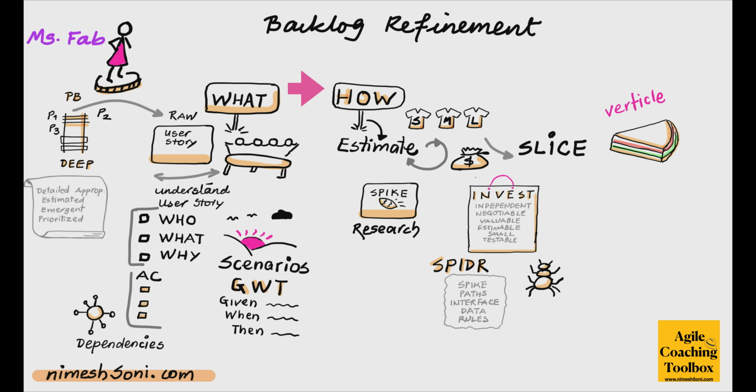And we don't want that because horizontal slices don't deliver any value to our customer. Instead, we want to look at it from the functionality point of view and identify vertical slices, meaning each slice has all these different layers of that cake that we are talking about. But again, focus is not on the technology stack. Focus is on the vertical slice. Focus is on us building a thin slice of that functionality and delivering it to the customer.